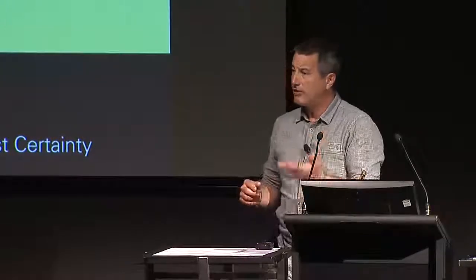What I think is an alternative and a better approach is for a 5D QS or an estimator to pull information from a model and then push back accurate data at the right time for that team to absorb it. This means that the efficiency of our projects gets tested at an early time before the models are complete, and that's when we have the best opportunity to influence cost. The other thing is it establishes a living cost plan, and that can be rerun weekly, endlessly, and it gives real-time feedback on where costs are at.